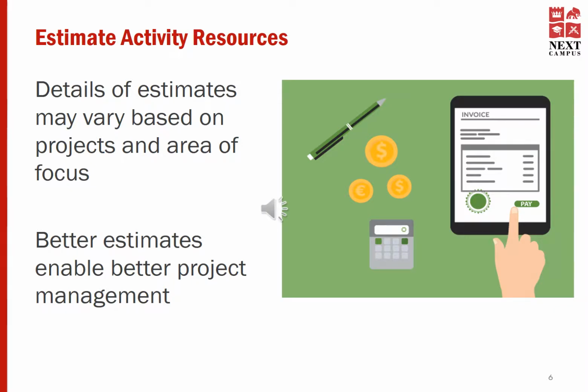estimations are not right. However, at the beginning of the project, you don't need to estimate all the resources in detail for the entire project duration. You may work on progressive elaboration; the most critical areas of your requirements can be considered for your estimation. As time goes, you may work on the other areas and estimate the resources needed. I think that will be the best approach in order to mitigate the risk around your estimations.